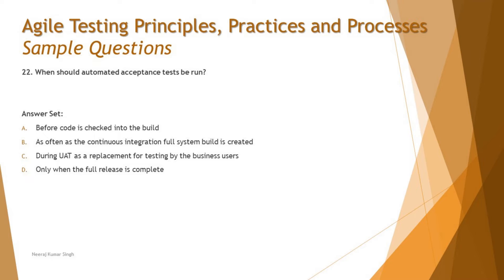A UAT phase would probably be done at a collection of sprints together. It's not necessary that your project is limited to one release — you may have two or three releases to complete a product. Acceptance testing can happen at each release, not just the final one. There is also a difference between acceptance testing and user acceptance testing, alpha, and beta — refer to the foundation level for more details. So C is not the right answer.